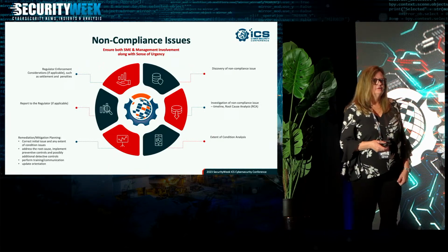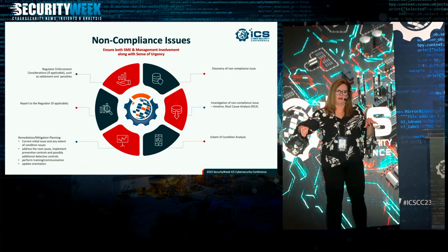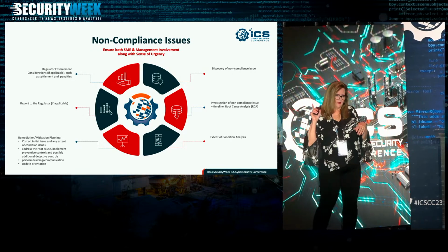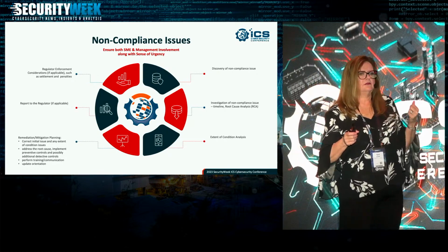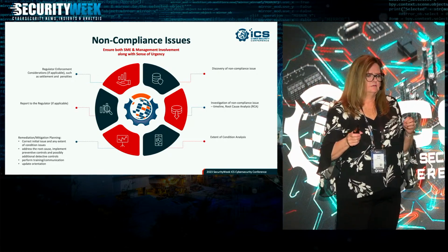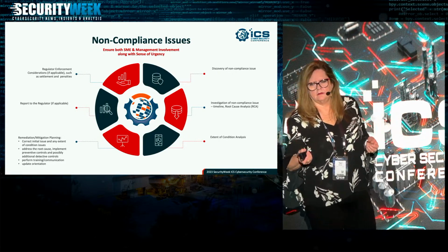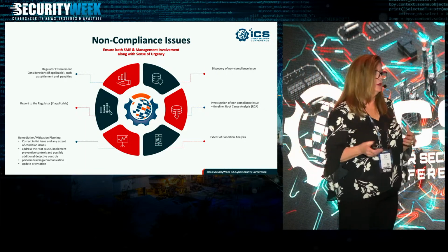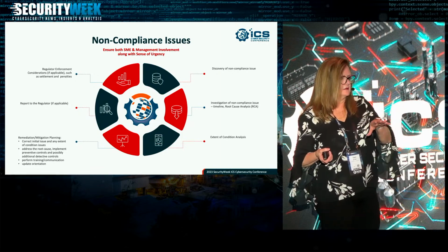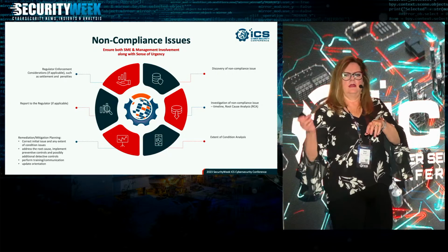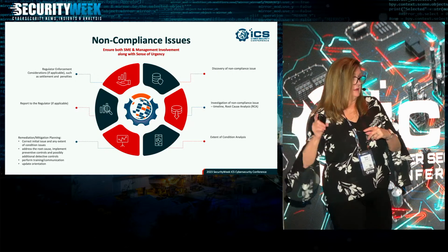Okay, so what do we do if we go out of compliance? We've met all the requirements, we've set up, we've got evidence. And by the way, on the evidence, make sure you come up with a very good naming convention for your evidence, a centralized location, and a way to have someone at a manager or lead level sign off on that evidence each time. Maybe it's a monthly thing. You're going to create some sort of artifact, and the SME will put that in the site, and then a manager will say, okay, looks good, and then someone can check off that, hey, we did that.